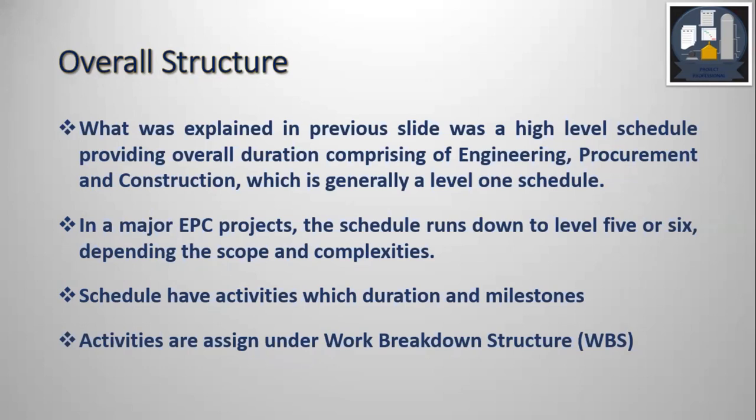The schedules have activities, which have a duration, and also milestones, which do not have duration. Activities are assigned under WBS — that is Work Breakdown Structure — or activities are arranged under different Work Breakdown Structures.